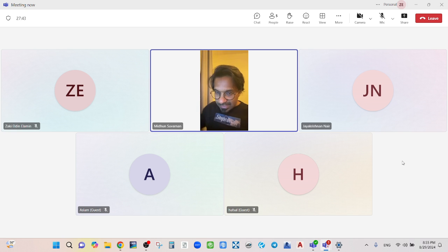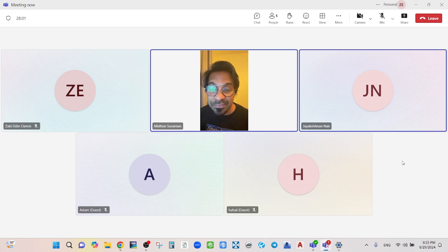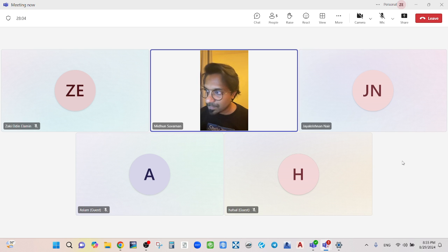This letterhead, or guarantee paper, the contractor will submit to the employer as the very first thing when the contract is signed. Submitting this performance guarantee or security to the employer is the first thing a contractor should do. He will get it from the bank, officially on the letterhead, and it will say: we agree that in the event of a default by the contractor, when the employer submits the request, we immediately give the full amount.